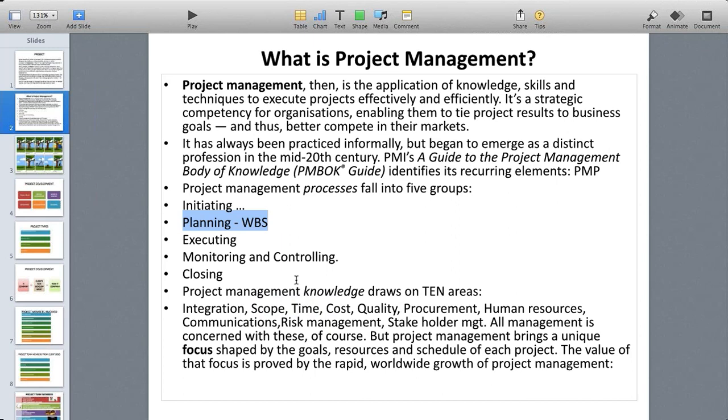And then planning. Based on the scope, time, and cost, the project manager plans how many people are needed and how much technology is needed to design this task. Here come procurement management and human resources management. Procurement is hiring technology, software, hardware, and all this. WBS means work breakdown structure. Once people and technology are hired, the project manager does the work breakdown structure: business analyst, 3 months, you have a task; designer, 3 months; developer, 3 months; like that.